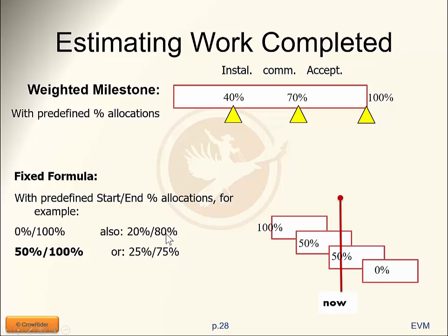You're leaving something out. The reason for this is that you have a whole package of work packages which are ongoing at the same time, and you wait for the last work package in the whole package to be complete before you declare all of the work packages to be 100% complete.